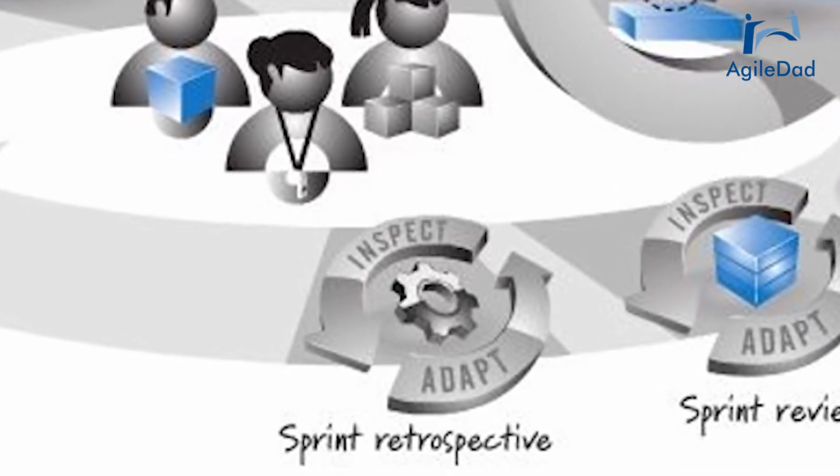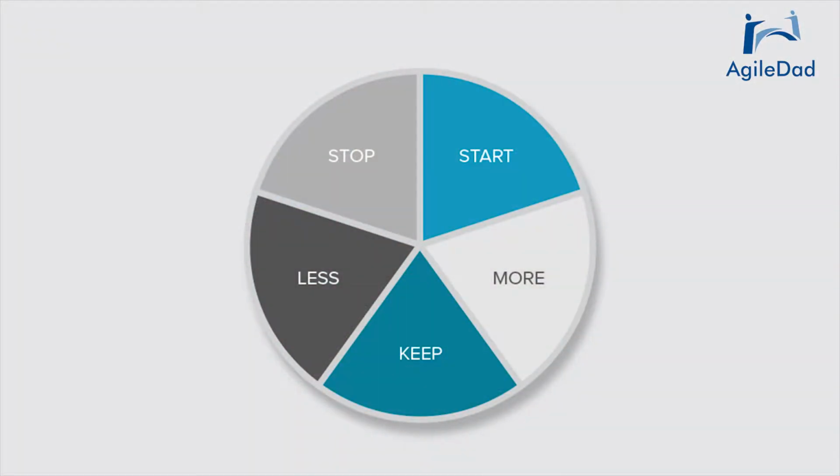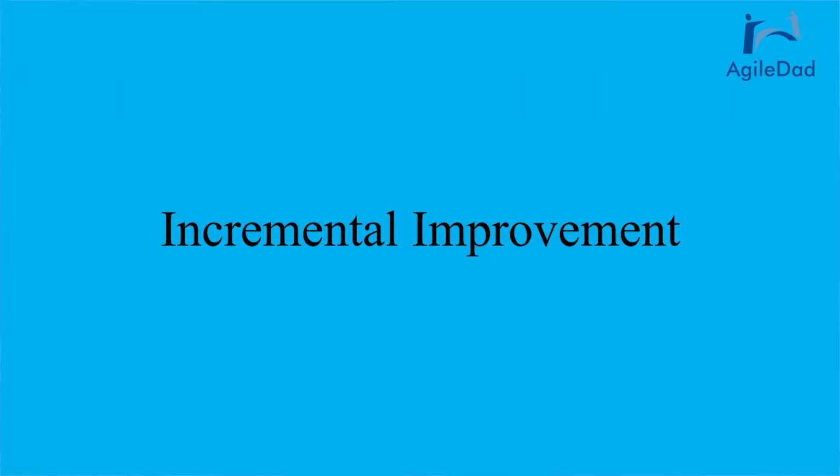This is why the Scrum Master is the person who facilitates that and is trying to lead the team in that journey as to how are they improving what they're doing. What things do they want to continue doing? What things do they maybe want to stop doing or start doing? What things do they need a little bit more of or less of, right? The key here is seeing what has been effective, what has not been effective, and what are the ideas that help the team to go ahead and improve in the short term and long term.